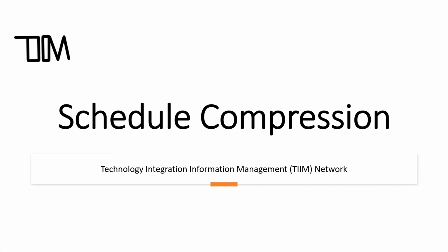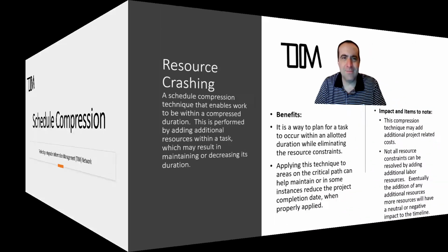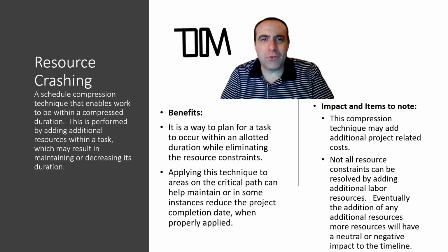For the remainder of this presentation, I would like to focus on schedule compression techniques. We are going to first start with the topic of resource crashing. Resource crashing is a schedule compression technique that enables work to be within a compressed duration. This is performed by adding additional resources within a task, which may result in maintaining or decreasing its duration.